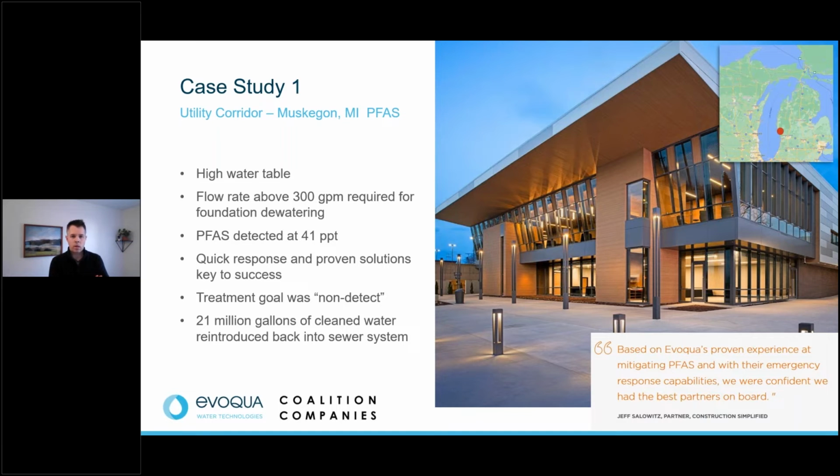This is a convention center, about 40,000 square feet of a facility that we were putting up here. And when we got on site, we ended up with some challenges that actually were not apparent right at the front end. So we had our front end environmental reports, our phase 1 and phase 2 environmental reports. And when the phase 2 came back in, it was really a subnote within the literature that we received back. It's about a 300-page report, and we ended up with PFAS on our site. At the time, there wasn't a ton of legislation. We were still learning about it. It was becoming a bigger deal. We wanted to make sure we were doing the right thing, and when we found it, it was a little bit later in our development process than we would have liked.